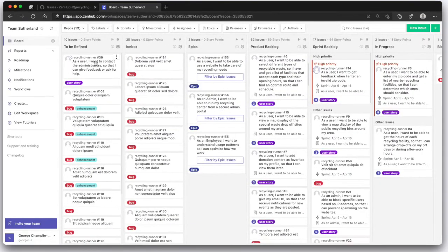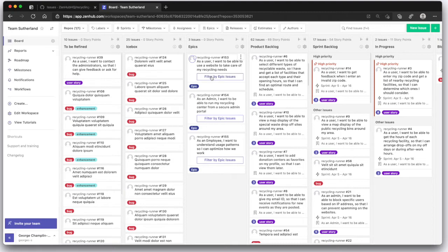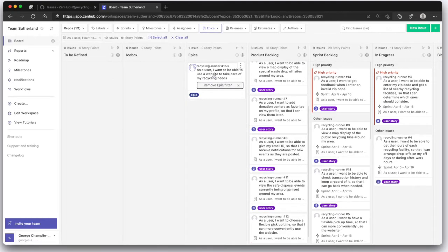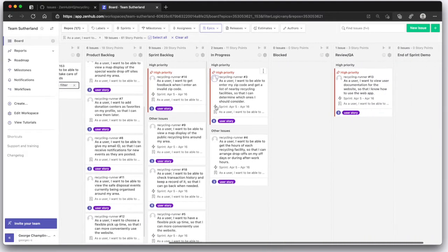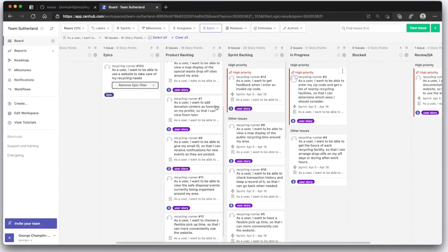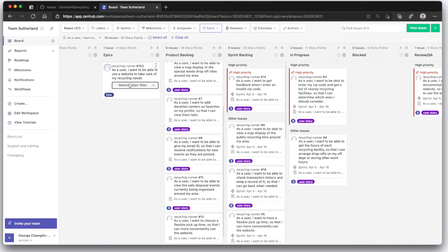We've got a column here for epics, an epic being a body of work that's going to take a few sprints. I can click this button and see just those issues that roll up into this epic so that I can really see what's going on with our high priority goals.